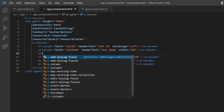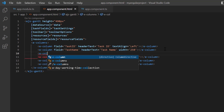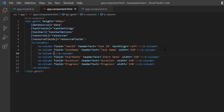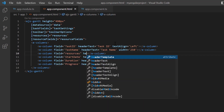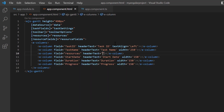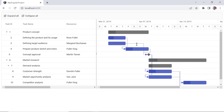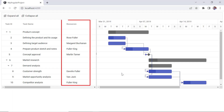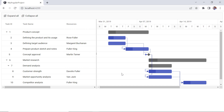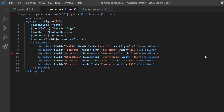Then add the column tag to show the resource details from the data source, and map the assigned resources of the task using the field and header text properties. Check the Gantt chart — the resource column is shown in the tree grid and it displays the resource names assigned to the task.